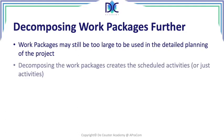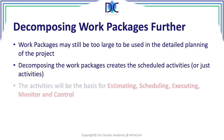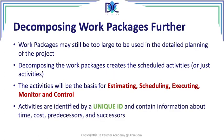Normally the work packages are too large to be used in a detailed planning, and we have to decompose them to create what we call scheduled activities, or simply activities. The activities will be the basis for estimating, scheduling, executing, and monitoring and controlling. The activities are identified by a unique identification number and contain information about time, cost, predecessors, and successors.